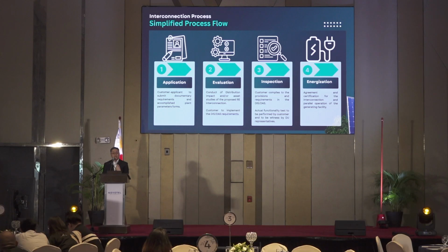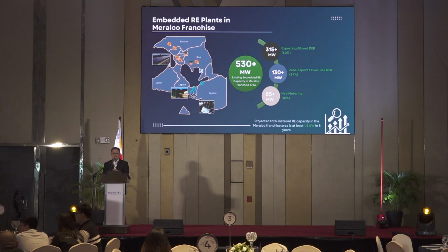So all the tests, functionality testing and commissioning tests, will be witnessed by Meralco and be performed by the plant. And lastly, for the final energization, these are more on the documentary requirements, the contracts, as well as the provision of the DU certificate on the generator unit capability, so that you can begin with the parallel operation of your generation facility.